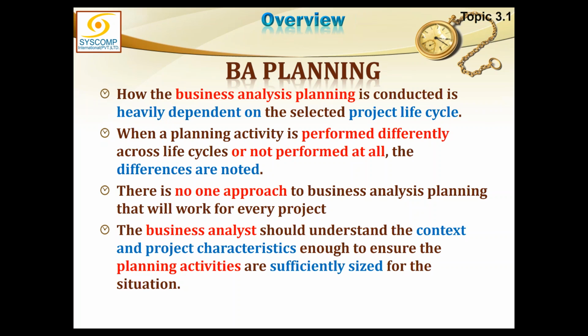And every phase is to be treated like a project. If you treat every phase as a project, every phase will have a charter. Every phase will be initiated. Every phase will be planned, executed, monitored and controlled, and closed. And then some deliverable comes out. Then you move on to the next phase. So the project management processes should not be called phases because they are repetitive in nature, not only in the whole project, but in every phase they will be repeated.